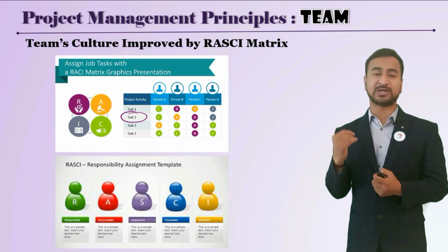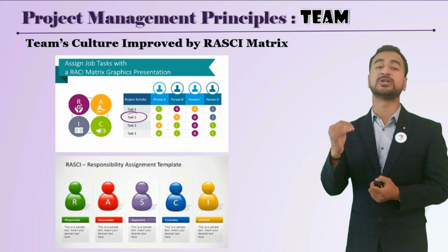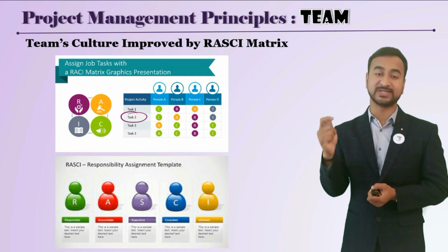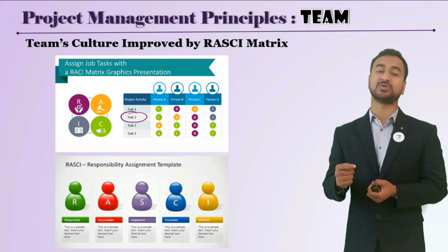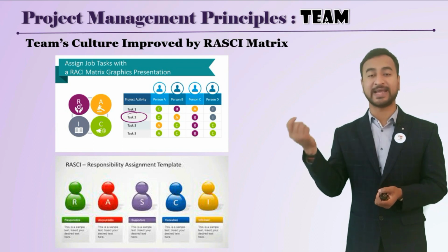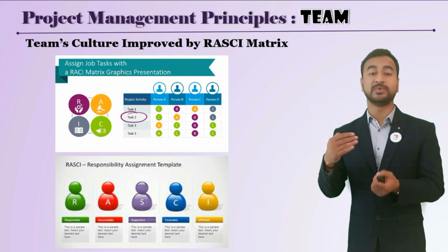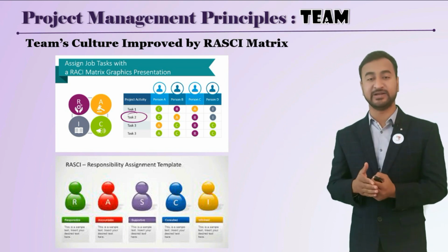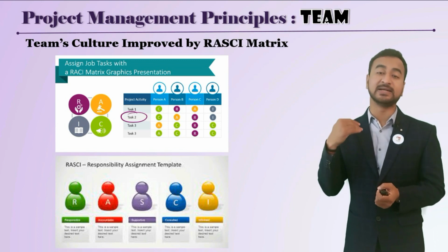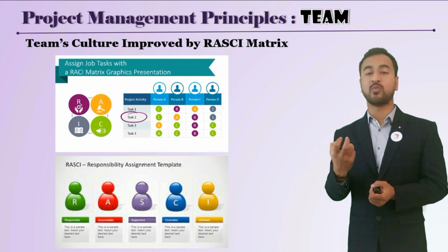each and every activity or task, the task owner is clearly defined, who is responsible for executing that task is also defined, whom to consult or take advice from, or whom to inform, is clearly defined for each and every task. That really helps to have a very homogeneous team spirit.